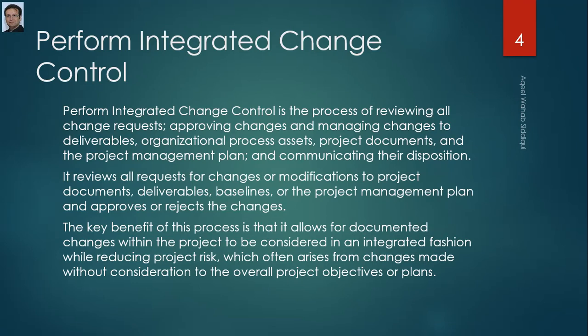So instead of accommodating your stakeholder, a project manager should have the courage to say no. It is the responsibility of a project manager to take the change request from the stakeholder, evaluate that change and its effect on cost, quality, and customer satisfaction, and then forward that evaluation form or change request to the change control board, and whatever the decision is shall be communicated to the stakeholder.